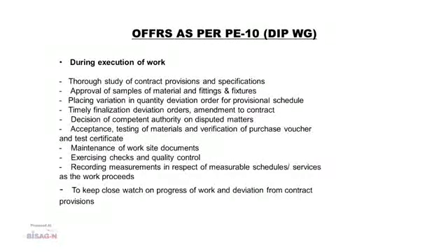Next is the stage of execution of work. In this, the obligations are thorough study of contract provisions and specifications, approval of samples of material and fittings, fixtures, placing variation in quantity, and deviation orders for provisional schedules.